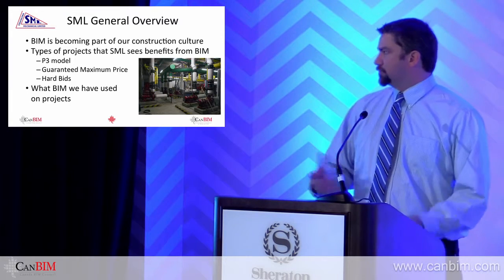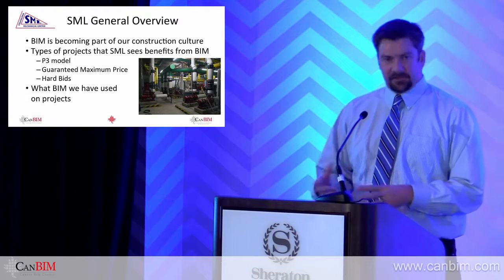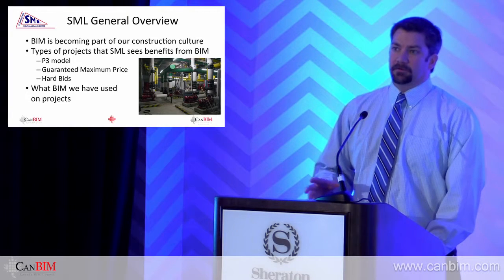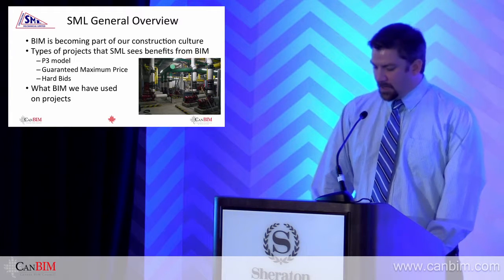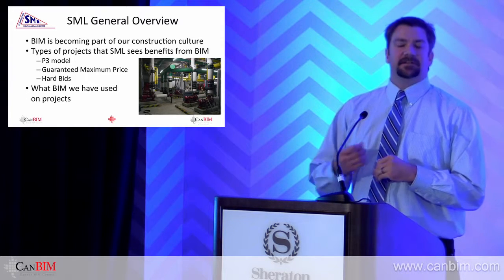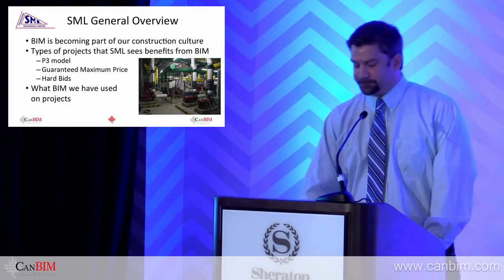The example that we're going to show today was a hard bid number. That worked out very well for us, because it was in the specifications and in the tender package that we had to carry a BIM portion for the project. So it also gave us the opportunity to allow a value to it that we can carry throughout the project. Like I mentioned before, most of the BIM that we've used on projects has been just as a reference. We haven't had drawings detailed enough that we were able to prefab from or do mechanical rooms from, more just as a reference.